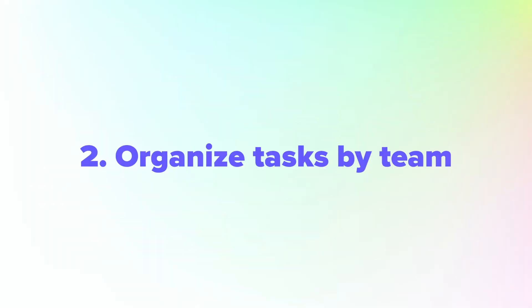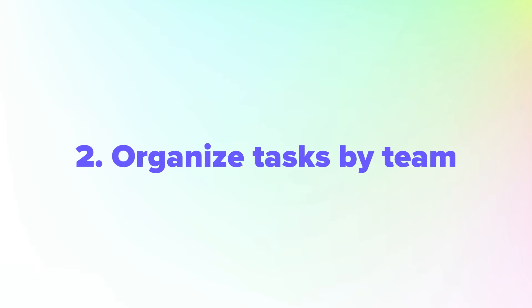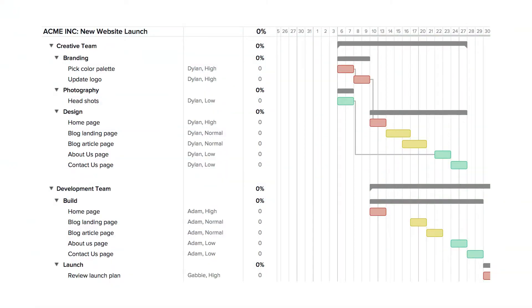In TeamGantt, you can use subgroups to break work down into phases. This makes your Gantt chart super scannable and enables you to collapse completed phases for a cleaner look. Feel free to get as granular as you want. In this example, we use nested task groups to organize tasks by the team responsible, breaking each team's tasks down into further categories of work.